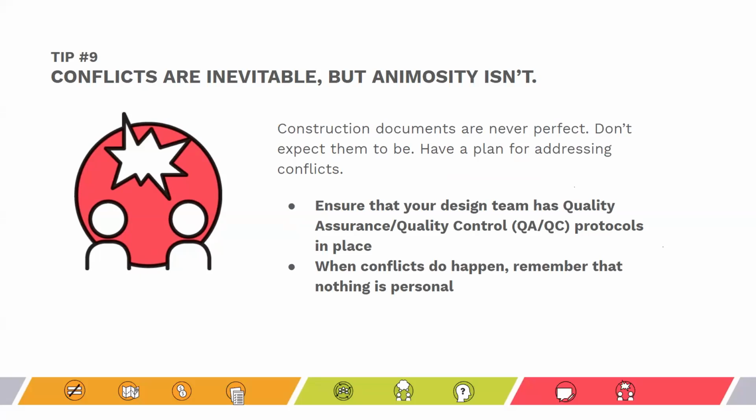Again, during that project kickoff meeting or even during interviews, talk to your team about their quality assurance and quality control protocols, or QA/QC. If they have these protocols in place, it can help minimize missing information, conflicts between drawings and specifications, and coordination errors between architectural and engineering drawings.